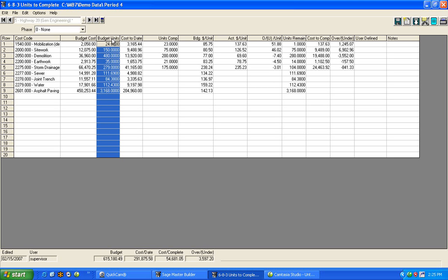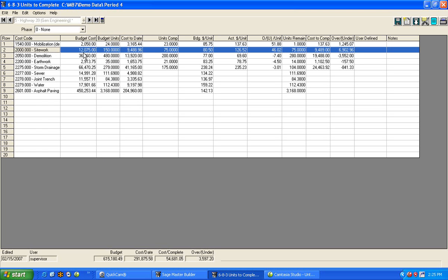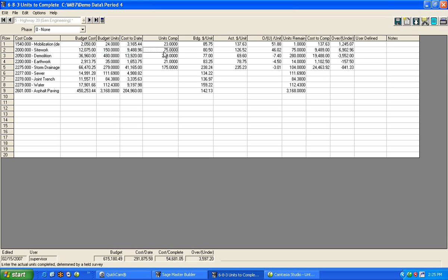It's up to you. Not everything is measurable, but for the items that are, what happens in Master Builder, and this is a great report, is it's in real time. I had a budget of $12,000. I thought I had 150 units to perform on this job. So far through my accounts payable, my payroll, inventory, equipment cost, I've incurred $9,500 in cost. My field foreman or superintendent has reported to me on his timesheet that he's finished 75 units.